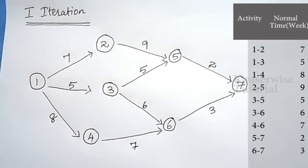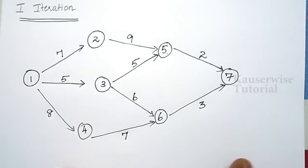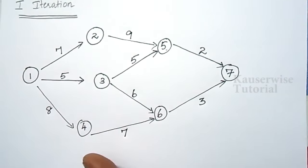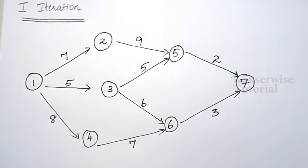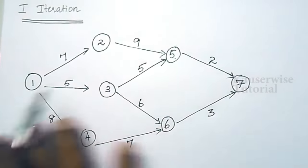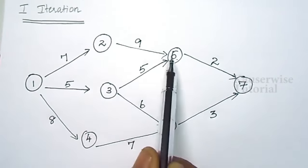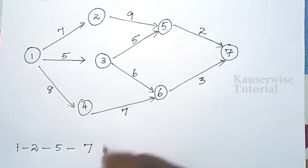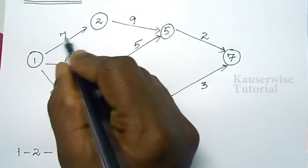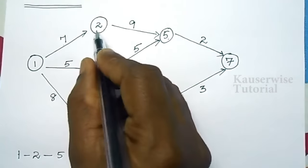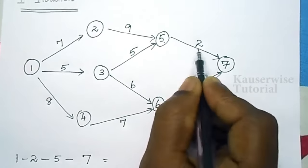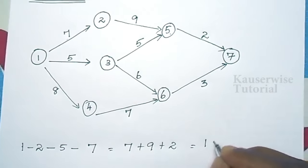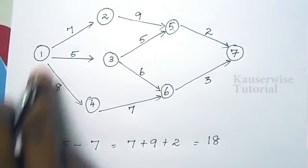After drawing the network diagram, the next step is to find the critical path — the path with maximum completion time. List all possible ways to complete the project. The first possibility is 1→2→5→7 with durations 7+9+2 = 18 weeks. The second possibility is 1→3→5→7 with durations 5+5+2 = 12 weeks.